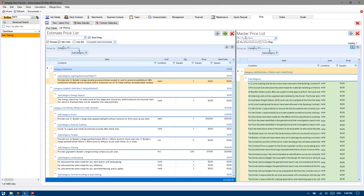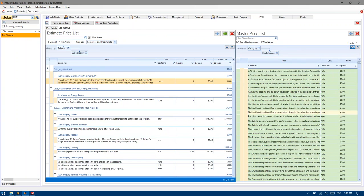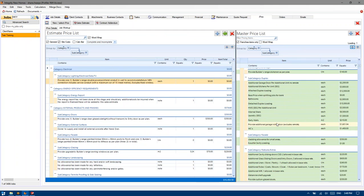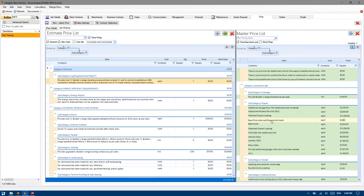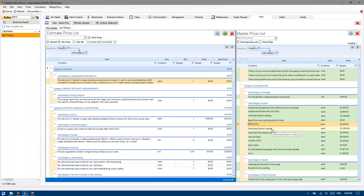So if you've got an area loading of 0.9 or 0.8 for example, you're not going to see these items appearing any cheaper on this side than they would if you were in Coffs Harbour where the loading was 0.99. It's only where the loading is greater than 1 that it applies a price increase.